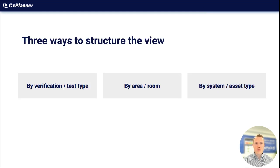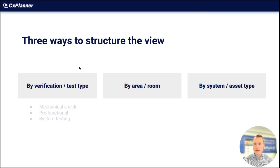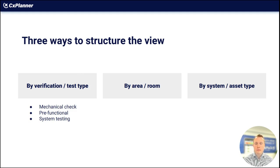When you're going to structure this test overview, there are three main ways to do it. The first one is by verification or test type. In this view, you can divide your assets into main groups — mechanical check, then the assets, pre-functional check, then the assets, and so on.